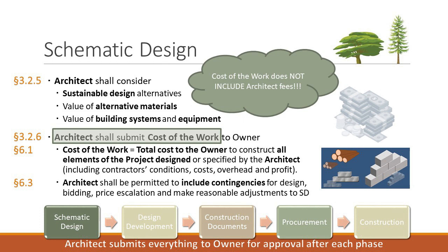I have had many a case where the architect has submitted the schematic design, and they're under a schedule to meet dates, and they start with design development right away, and maybe the owner sits on the schematic for a while, maybe it's a month later, 3 weeks, whatever it is,